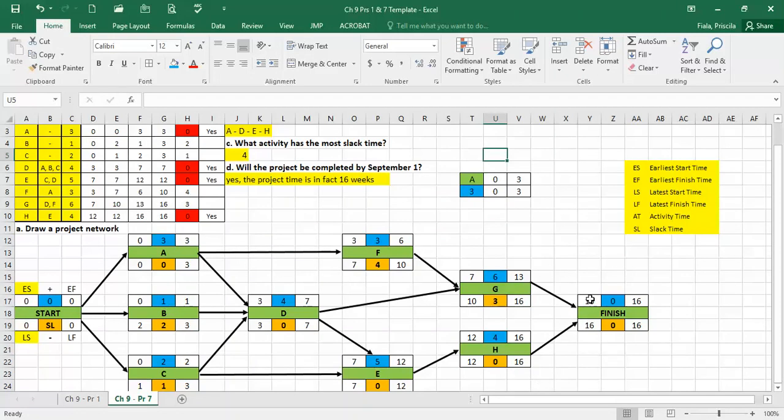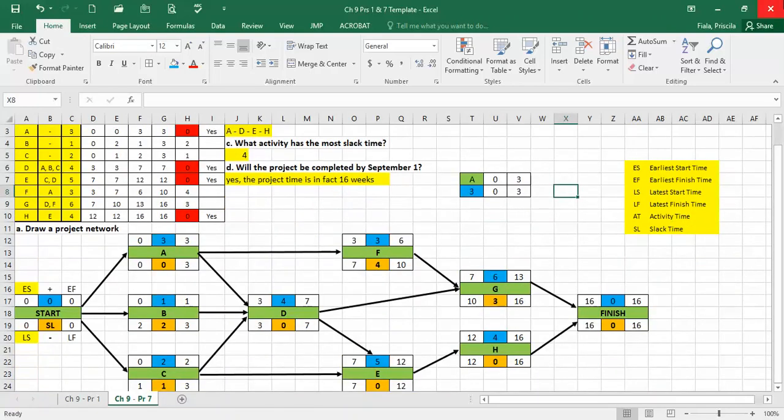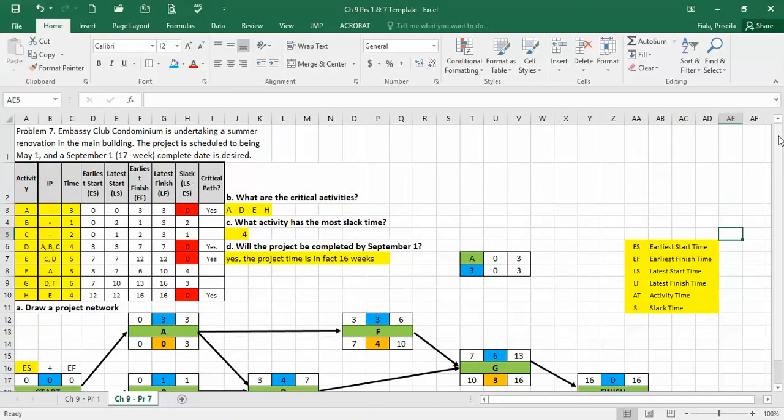I also advise you that even though I didn't assign on the homework to review the PERT formula for the optimistic, most likely, and pessimistic times and how they calculate that. Remember, optimistic plus 4 times the most likely plus the pessimistic, divided by 6. That's the formula. Please make sure you go through it, even though I did not assign it on the case that is due on the 15th, you will definitely see it on your midterm. And never hesitate to contact me if there are any questions.